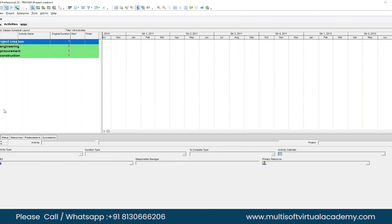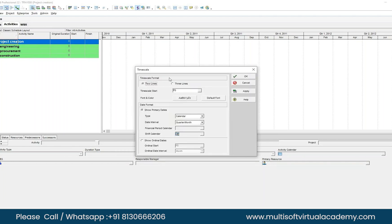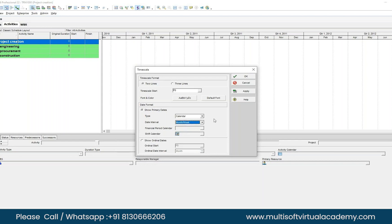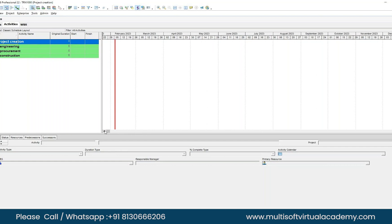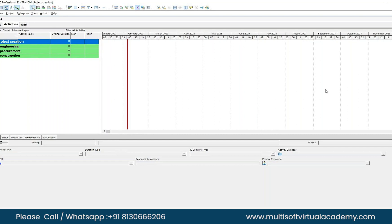Now let's adjust the Gantt chart timescale. Right-click on the Gantt chart to adjust the time scale. Right now it shows a quarter-per-month interval. Since our training project isn't very large, change the date interval to Month per Week. Click Apply. At the bottom scroll bar of the Gantt chart, you'll see a red line — that's the progress line. We don't need it right now, so uncheck it. Look for the zigzag line icon on the toolbar and uncheck it.